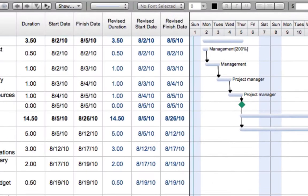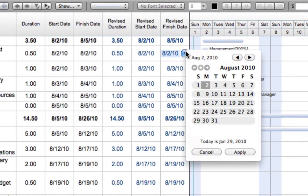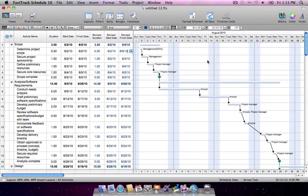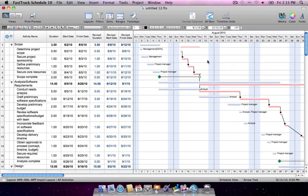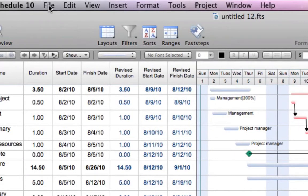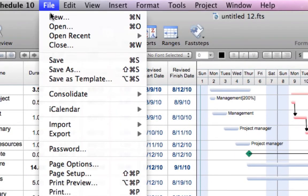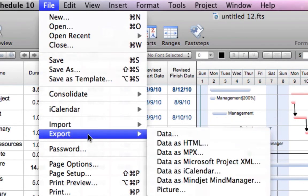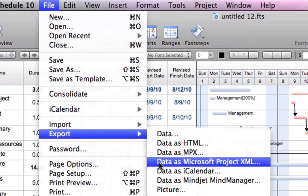You can rely on FastTrack Schedule to plan, track, and report status updates such as delayed activities. The delays are reflected across the entire project. And to share changes with a Microsoft Project user, simply export as Project XML.